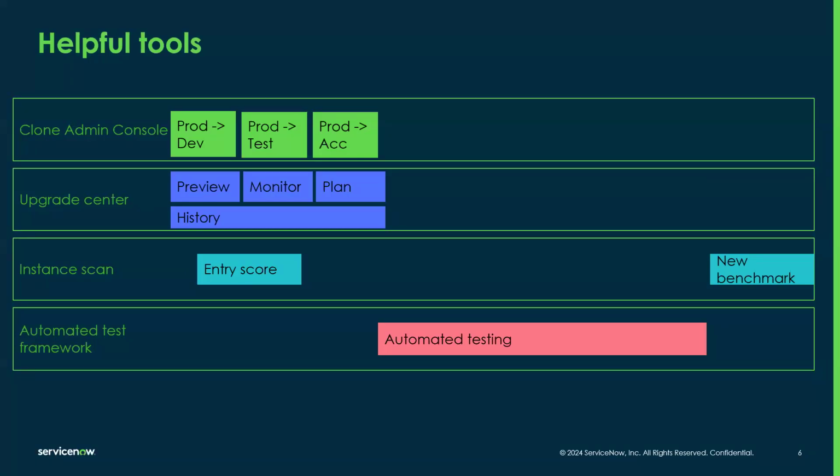And indeed, maybe to elaborate why it's not recommended to run it in production. And I think that goes for every testing, right? Throughout this, and that comes a bit in the manual testing that's in the one click away, but that's more on the tooling. There's still a lot of manual testing. But the quicker you're able to uncover any test findings in your development street, the cheaper it is to fix. And what do I mean by that? If you have new development or you're doing the upgrade test on development, but it can also be a developer building something new. If you find that already while it's still on development, at the first time you touch it and you find it and then fix it, it's only one person that has touched it, so it's cheaper.